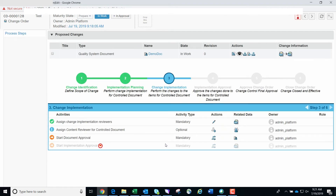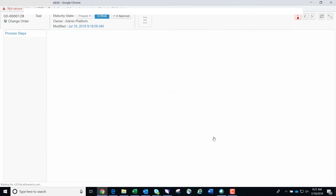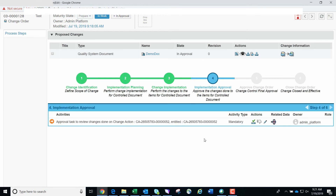This task has now been fulfilled and we can move to starting the document approval by clicking the promote icon in the actions menu again. This moves us to the fourth step in the process steps screen where we will need to approve the approval task for the change action. We click the Approve icon in the actions column, enter a comment, and then click Approve.